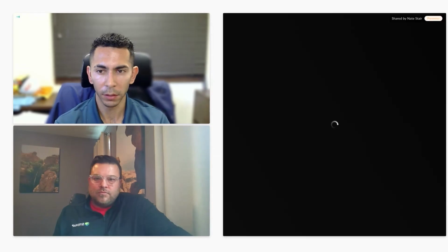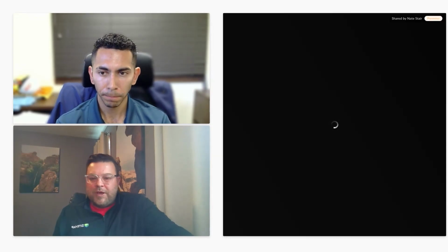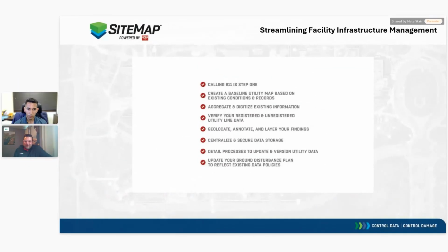It would have also affected the schedule. These things take time, and being able to identify it there takes more schedule uncertainty out of it as well, which is a main driver here on campus, because we try to plan projects so they either start when school is out or end before school goes back in. That way we're impacting the campus and the students as little as possible. Yeah, it's ongoing challenges for sure. Yeah, it's been a pretty awesome project to be a part of.